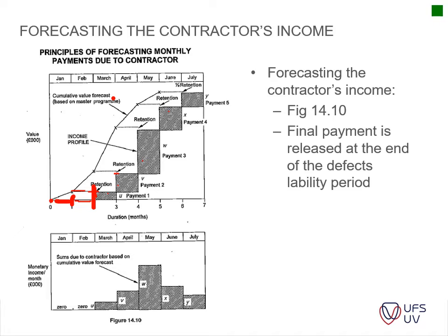Okay, so you remember, the project is now practically complete here. Then you put in your last invoice, the practical completion invoice, and you get your payment there. Then you have to wait until the defects liability period is complete, which is a year or 3 months depending on your contract. So you only get it after a while on this side.